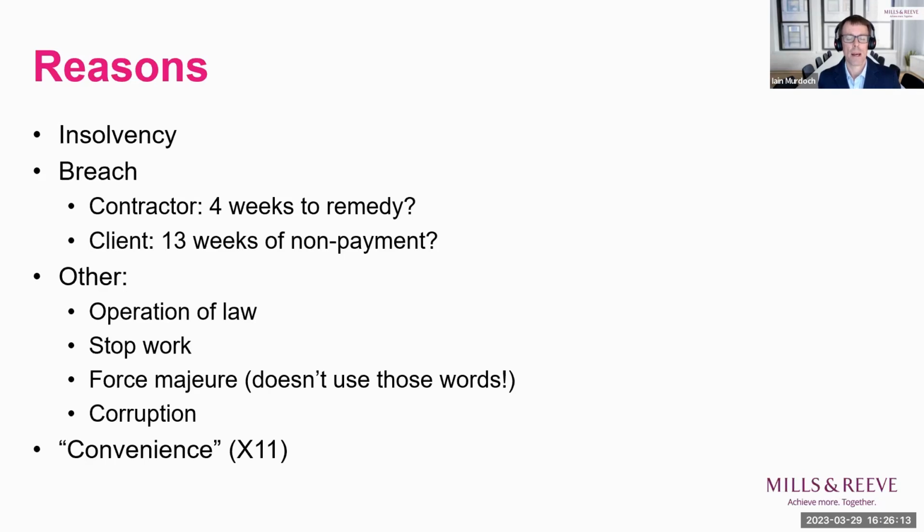But one thing that I'm going to highlight later on is the insolvency regime set out in the NEC termination clauses needs to take account of the local law. Even if you're in England and Wales, make sure you've picked up recent changes, and that you're comfortable that the insolvency regime that's referred to actually fits with the jurisdiction that you're working in. But that's where the NEC starts, and it's a good place to start.